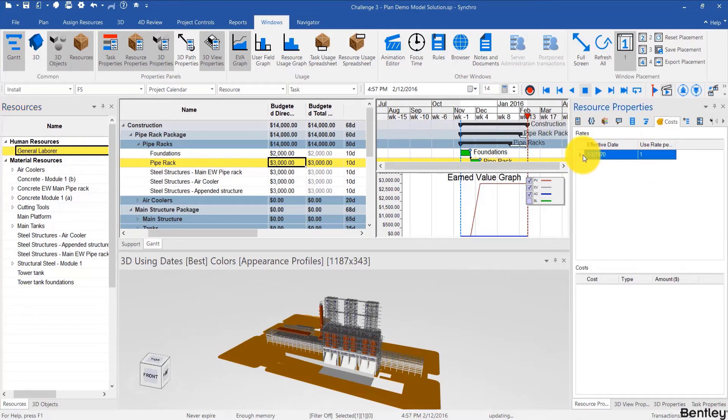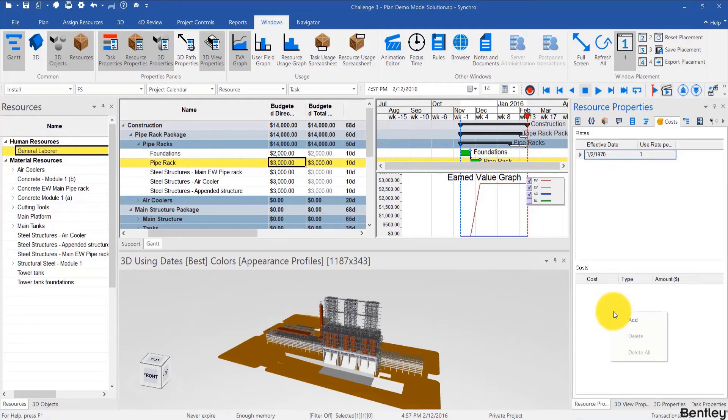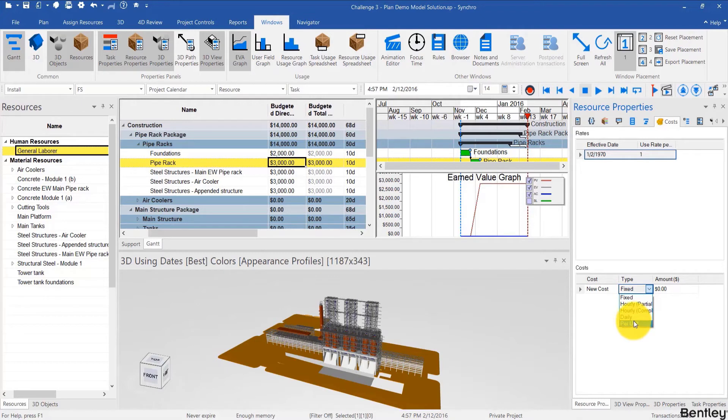And you have to select an effective date here because the costs may change over time over the course of a project. So I can choose the default date which is in the 70s and add a cost. Let's say it's going to be a daily cost. You can also do per unit. I'll explain that in a bit.